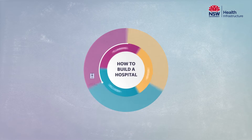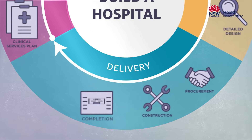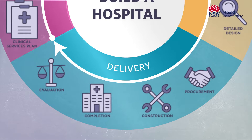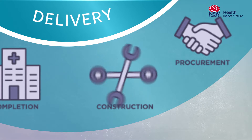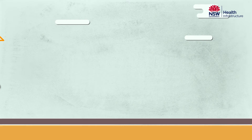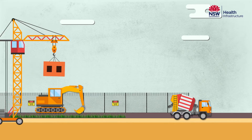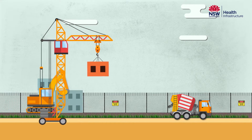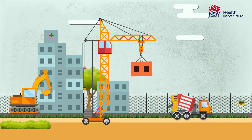Once our detailed design is finalised, we move into the delivery phase. This starts by issuing a tender to engage a construction company that can build a high-quality health service on time and to budget. Construction involves enabling work such as installing site fences and site offices, early works such as demolition and installation of in-ground services.